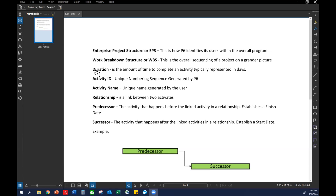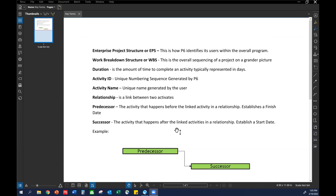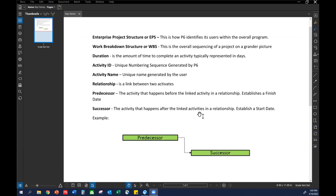Your durations are represented in days — this is how long a certain activity takes. Your activity ID is unique numbering that P6 generates once you start inputting and adding activities. Your activity names are something the user will do — us as PM, superintendent, assistant project manager, project engineer. So this is going to be like your foundations, your rebar installation; we'll assign durations to those items. From there we'll get into linking activities and assigning predecessors and successors. Your relationship is typically your link between your activities — the arrow represents that link.